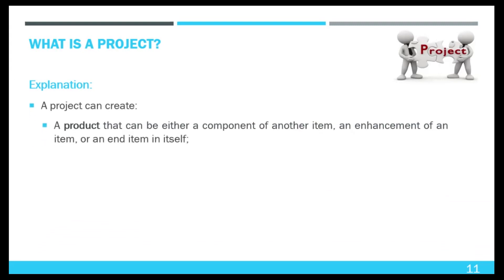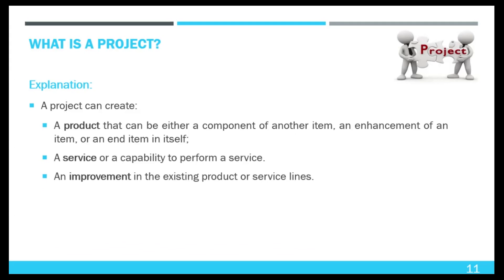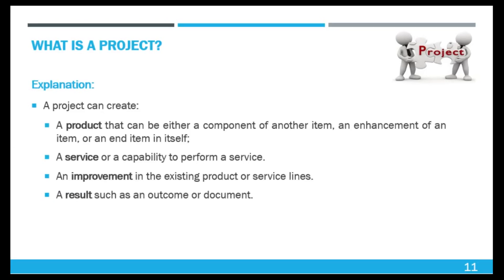A project can create a product that can be either a component of another item, an enhancement of an item, or an end item itself. A project can create a service or a capability to perform a service — that is, a business function that supports production or distribution. A project can create an improvement in existing product or service lines, such as a Six Sigma project undertaken to reduce defects. Or a project can create a result, such as an outcome or document — for example, a research project that develops knowledge to determine whether a trend exists or a new process will benefit society.